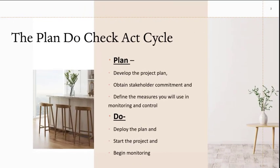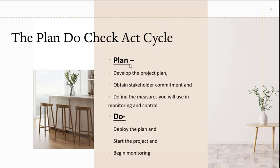The PDCA cycle reminds the project team to define what is to be measured during the planning phase. It also reminds the team that this approach is cyclical, not done just once. We start with planning, develop the plan, obtain stakeholder commitment, and define the measures we use in monitoring and control. That has to be done in planning.